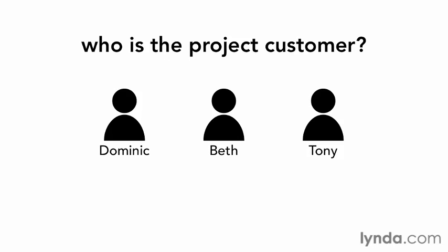Who's the customer? As the business owner, Beth is going to provide the funding. She confirms her role as moneybags by telling you the budget. Tony is going to tell you what's great about the new space, but Dominic is the one who describes the purpose of the project and communicates several objectives. Beth also communicated her trust in him to do things right, so Dominic is the customer in this case.